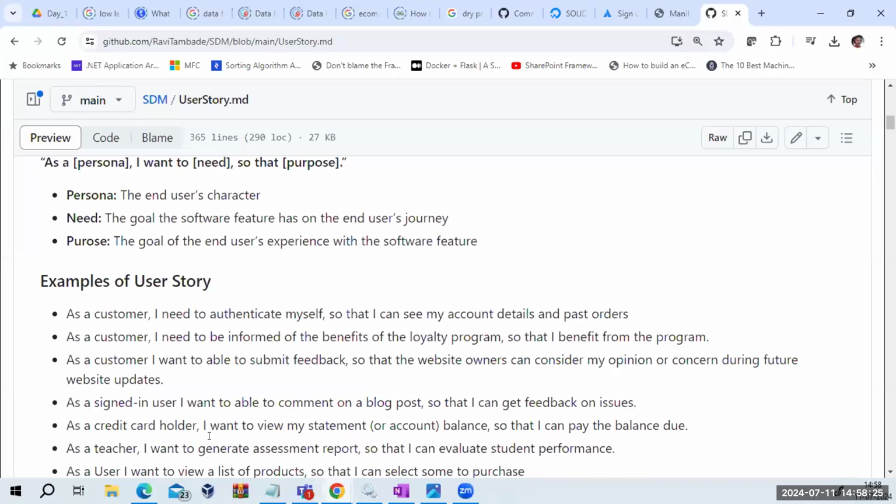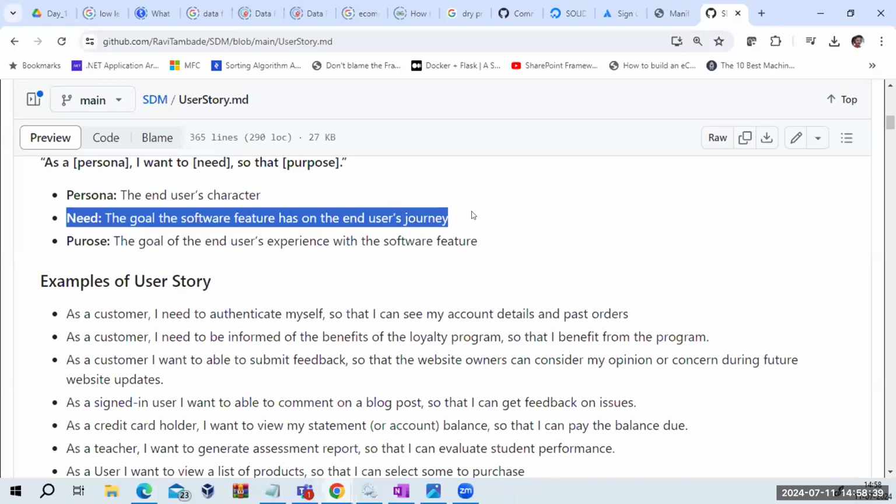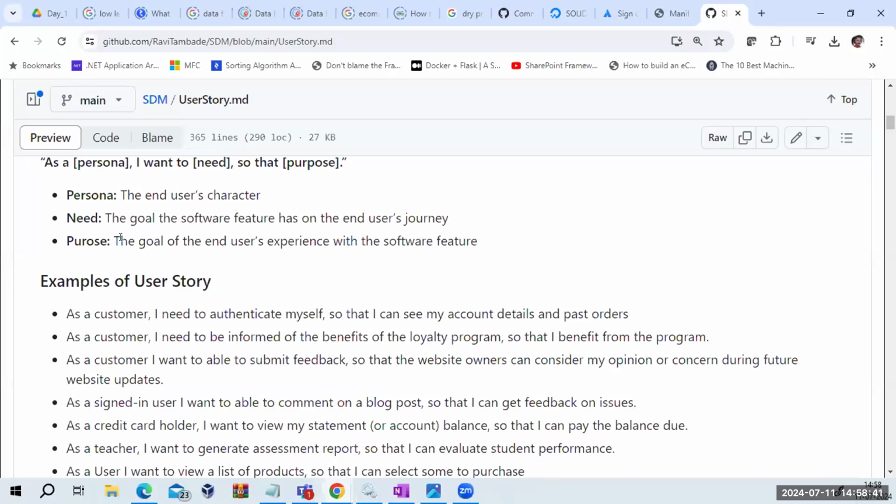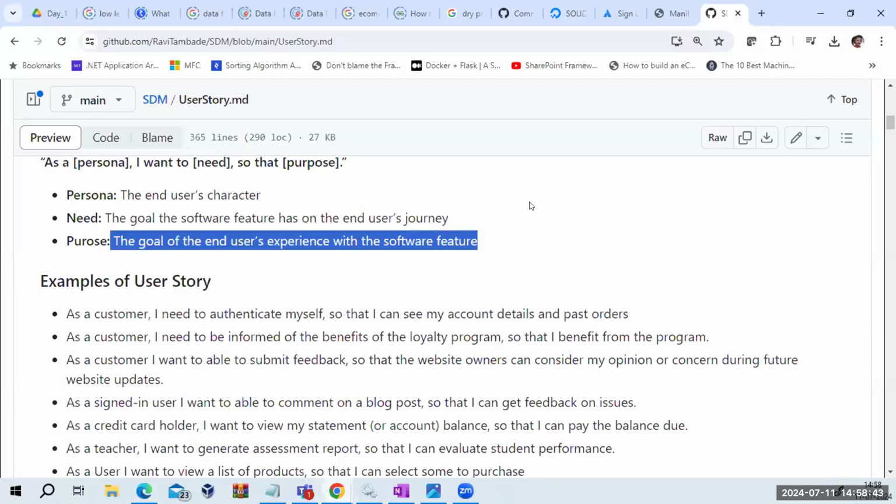Yes, sir. So it's very difficult to capture all the requirements, but it's very simple to define these kinds of stories. So who is this particular person? Who is the particular character? What is their need? What should your software do? And why should your software do that work? What is the outcome of it? This gives very good information under the user story description part, so that this much information will be sufficient just to work on that small area.